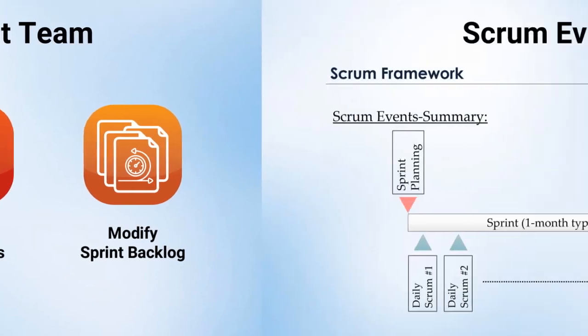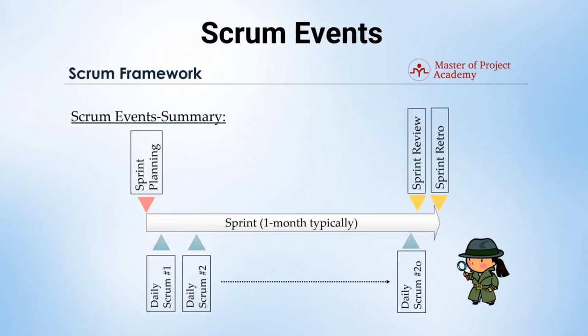So next we will discuss Scrum events. A sprint contains 4 types of events. You may also hear events referred to as ceremonies or simply meetings. The events are the sprint planning meeting, the daily stand-ups, the sprint review, and the sprint retrospective. These events are designed to maximize the opportunities for feedback and continuous learning, and are a key part of achieving agility. In between these meetings is where the work of the issues of the sprint is completed. We will discuss each of these meetings separately.